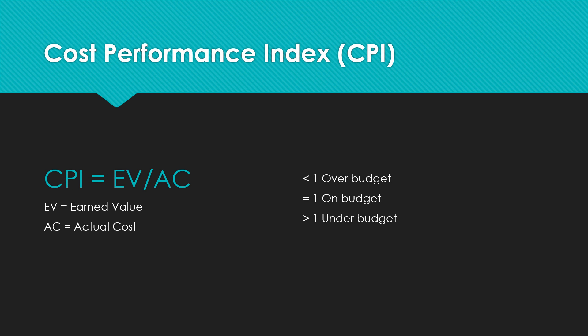CPI is cost performance index, and CPI is equals to EV divided by AC — earned value divided by actual cost. If CPI is less than 1, your project is over budget. If CPI equals 1, you are on budget. If CPI is greater than 1, your project is under budget. There could be a question which says the CPI of your project is 1.6 — that means 1.6 is greater than 1, so your project is under budget.